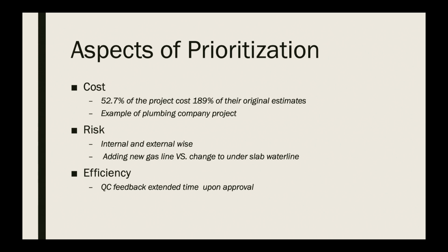The external risks could be from the performance aspect, process aspect, and schedule aspect. Examples are whether the new requirements will drive the performance of the software system away from the expectation. Will it delay the original plan, which could cause more money to be put in? However, risks like this could be avoided by calculating the risk level of a new requirement.